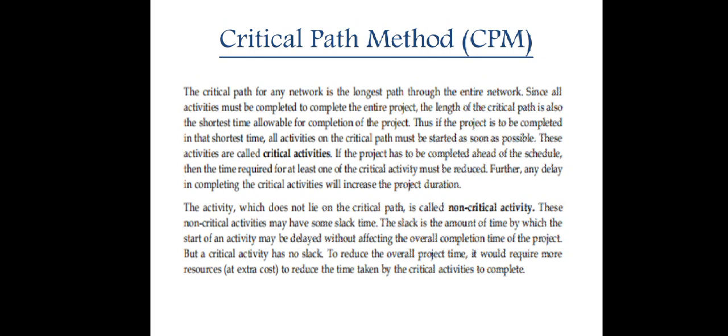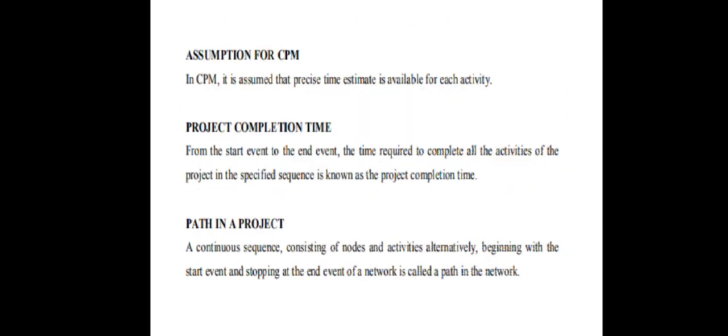So what is slack time? It is the amount of time by which the start of an activity may be delayed without affecting the overall completion time of the project. But a critical activity has no slack. To reduce the overall project time, it would require more resources to reduce the time taken by the critical activities to complete.